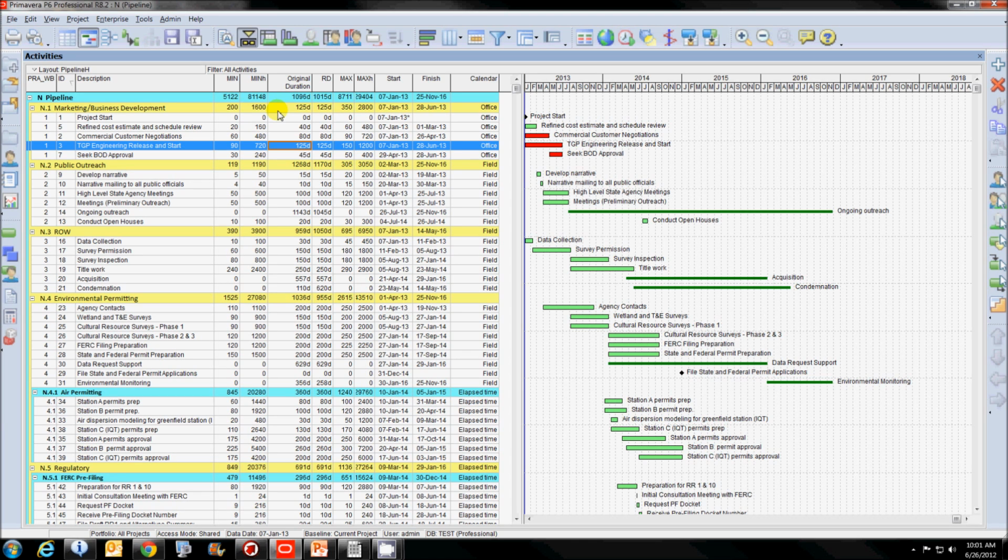But on the multiple calendars, it's probably very important to do everything in hours. Primavera P6 does everything in hours anyway, and does all its calculations. So that might just be a little caveat. Try to think in hours, though.